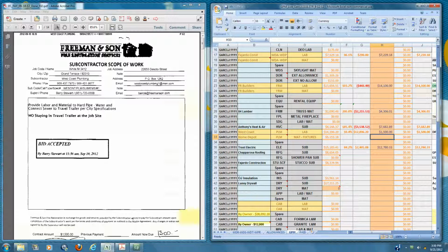So we also want to be sure to take note of this column F. If these percentages of difference ever get over 90%, you need to email the PM and let them know what's going on. So again, if these percentage differences for the OS bid amounts and the PM budgets are at a 90% difference, you're going to need to email the project manager and let them know.